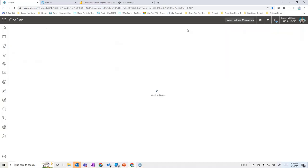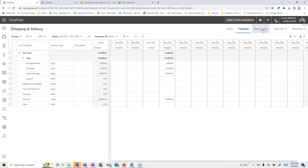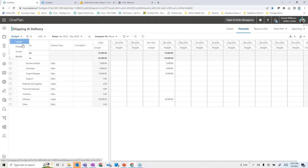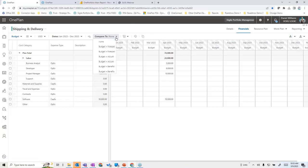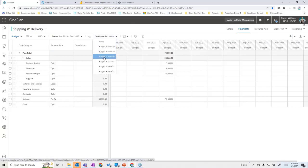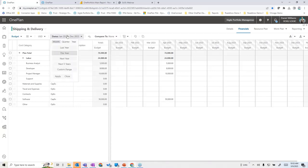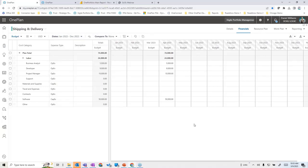We also have a financial planning capability that lets us structure financials as we see fit. Resource planning rates are used to automatically bring labor costing and its timing from the resource plan. We can also add non-labor costs like software. We can track cost types including budgets, revised forecasts, actuals, and even anticipated benefits or revenue in a time-phased fashion — and compare budget to forecast, budget to actuals, across different time horizons.